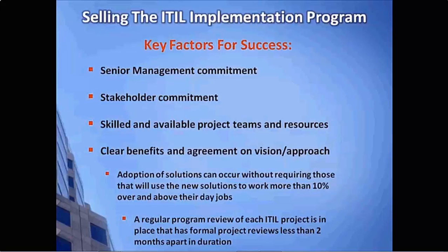Again, the visioning stage will help you hone that and fashion that so that it does become clear in terms of what that vision and benefits might be. But those need to be clearly articulated, and everybody needs to agree this is what we're going to get out of this effort. You need to know that the adoption of the solutions should be able to occur without requiring those that will use the new solutions to work more than 10% over and above their day jobs.